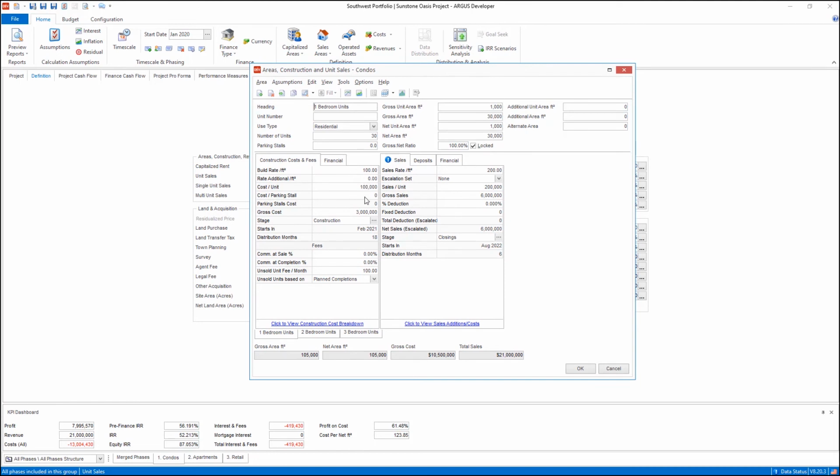So that's the benefit of creating that time scale at the beginning of the project, because now as I go through and I model the remainder of this development project, I can link the correct expenses to the correct stage that they should be in. And I could do the same thing with revenues and market assumptions as we build out this project.